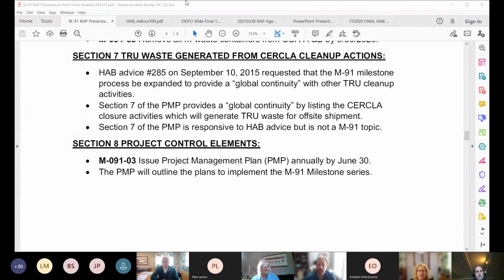We were really lucky when we got the Recovery Act money, and because we were ready with what Tom just called low-hanging fruit, we got a heck of a lot of cleanup done on the river, an amazing amount for that money. It's because there was planning in advance and things were, as we call it, shovel ready.